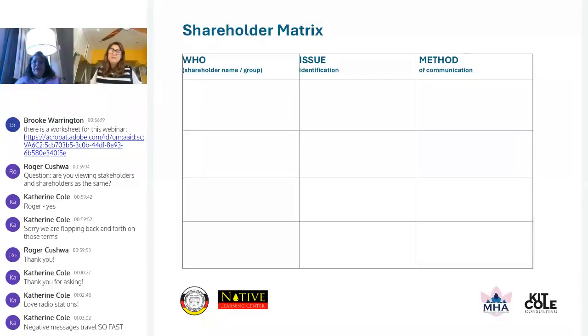And so when you're getting an approval from a federal agency, for instance, the Bureau of Land Management, like a renewable development project, a large project, solar project or wind project, you have to demonstrate to the broader public that you have done the communications that were necessary to ensure that there was a threshold level of effort for that.